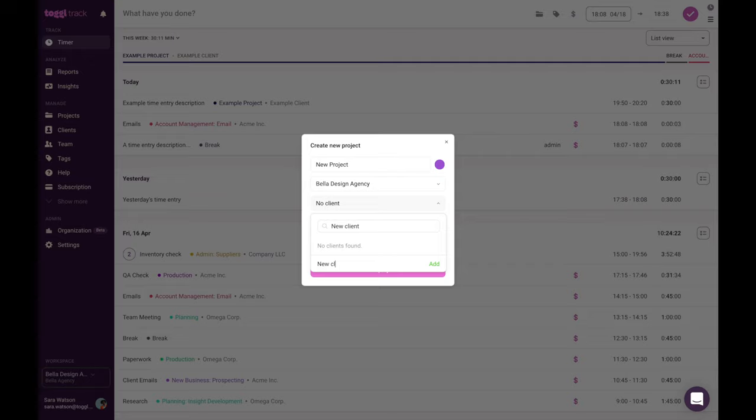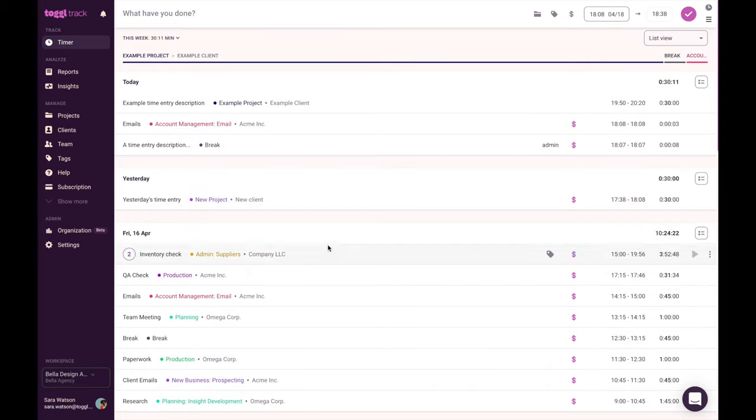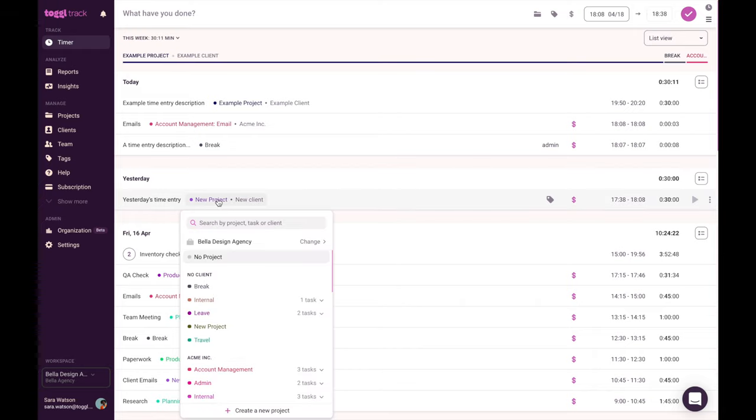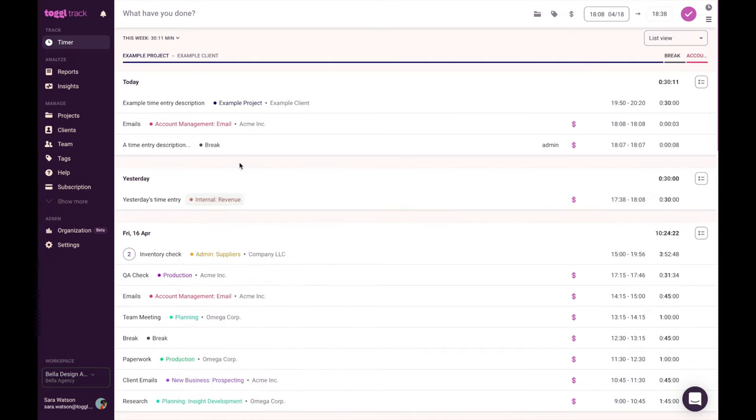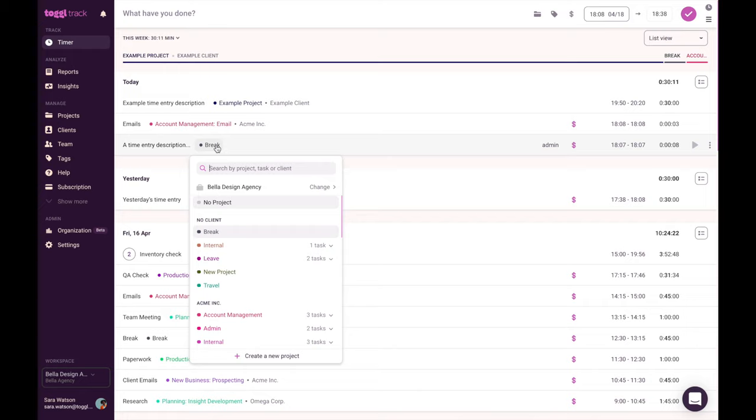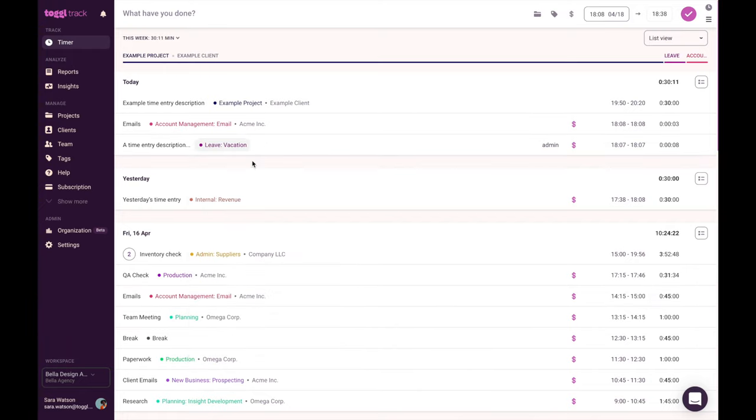When you create a new project or client, they'll be saved into your workspace so that you can reuse the same project or client names for future time entries. Within a project, tasks can be created in projects to help categorize time usage. Tasks are a startup plan feature. They provide an extra level of hierarchy within projects. In other words, think of them as sub-projects. Similar to projects, they can be allocated to a specific team member.